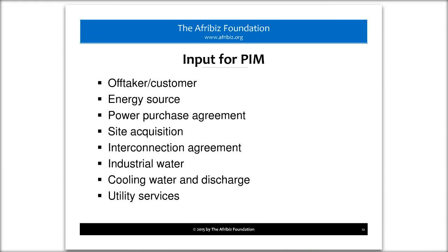There can be an instant shift that totally changes the dynamics of your project. And so it's important to keep all of these things at the forefront, at a level where you can say, okay, what's going on with that? I know that this is on track, this is off track. And at the very end, we'll talk about what we call a no-go platform. But basically, you'll be able to indicate whether it's green, yellow, or red, and what the issues are that are holding it up, so that you can keep track of these different elements.